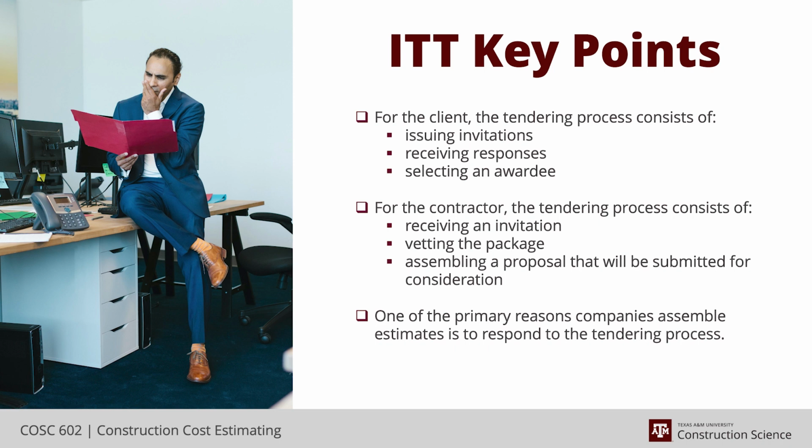It's a simplified statement where they're doing quantities, they're developing execution plan, they're pulling together pricing, pulling together labor, and analyzing whether or not they're too aggressive or too conservative in their estimate before they finally put on their markups and submit it.